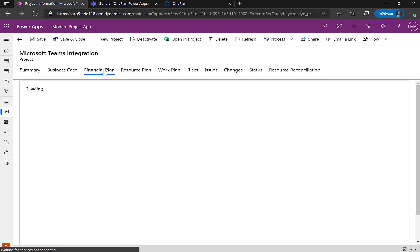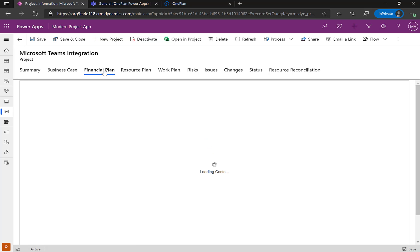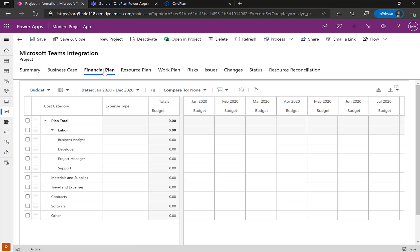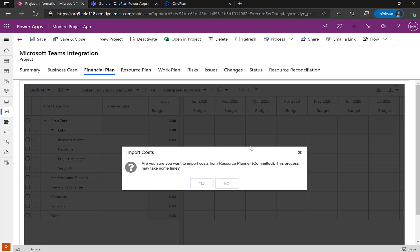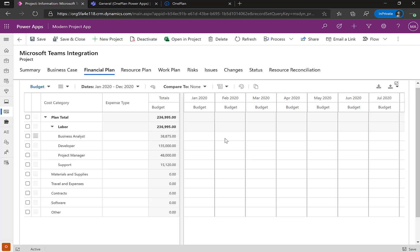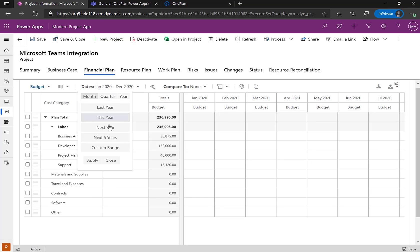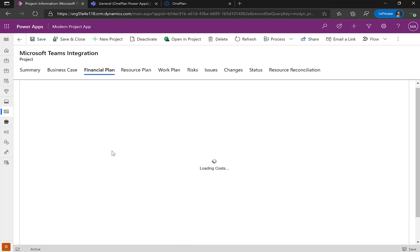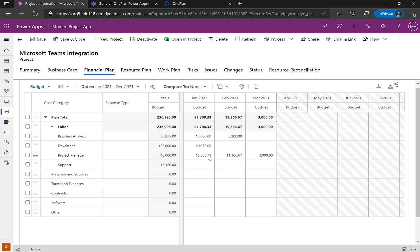I can also do financial management for budgeting — both CAPEX and OPEX. Going to my financial plan and clicking Import brings in cost data from my Microsoft Project Desktop file. You can see it's already populated my financial plan from the Microsoft Project file.